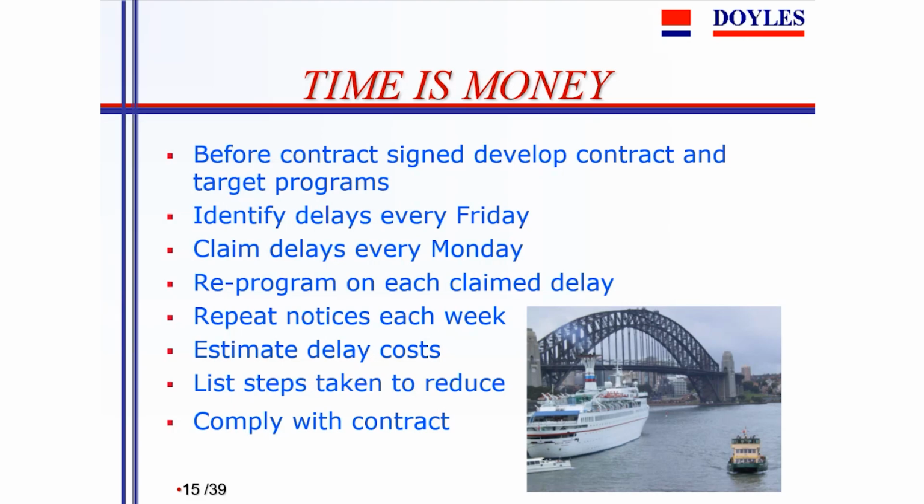The other aspect is that it's important for a contractor not to exaggerate a variation, and important for a principal that he pays fairly for a variation. There are often disputes over variations that can go on if either of the parties adopts an unreasonable attitude. But variations are a constant in contracts. You should be careful to read the variations clause, and you should be careful to make sure that you've notified your claims within the time that the contract provides.